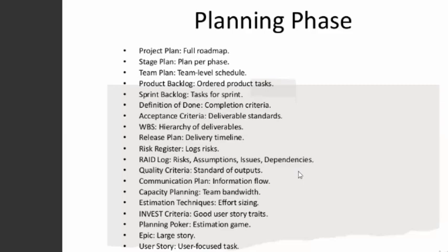By the time you estimate the effort, you now move all the items that have been prioritized, estimated, and identified in their smallest bits of tasks that need to go into the works, and highlight all of them into what we call the sprint backlog. So that's why it's called tasks for sprint. Definition of done. Once you're done, you move into a sprint. A sprint, like I mentioned earlier, is a duration of 2 to 4 weeks of actual delivery of the tasks highlighted in the sprint backlog items. So usually 2 to 4 weeks duration.